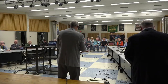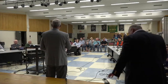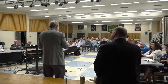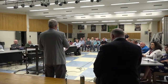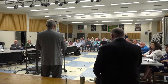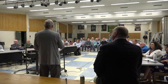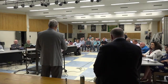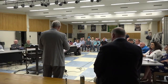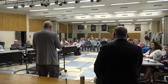The last time we were out here was 3 months ago in March, not here, but for the all boards meeting. At that time, we had multiple options here, and the school building committee and permanent building committee chose three options to study further. And those were, we call them AR1, which was kind of a minimal addition renovation scheme, AR2, which was a much more substantial and invasive addition renovation scheme, and then NC1, which was new construction on the same site.